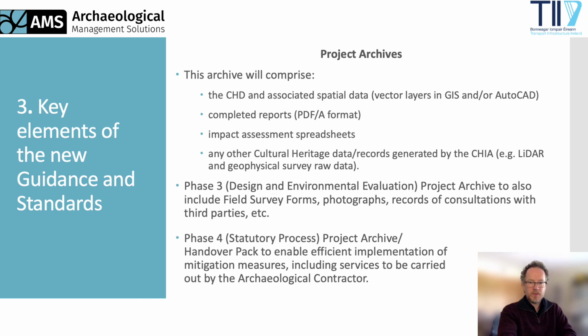It's highly likely that post-consent services will be undertaken under a separate contract to the Cultural Heritage Impact Assessment, so the information handed over needs to be complete and accurate to ensure the efficient procurement and delivery of services, including the commitments made within the EIAR.